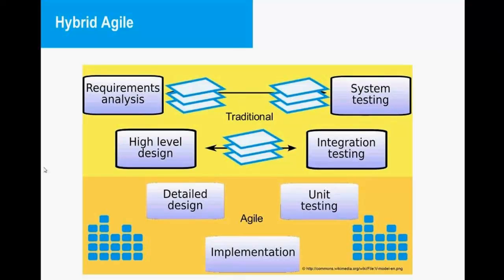What is special about the V model is that each phase must be finished before the next phase begins. So you have to go down the V on the left and then go up to do all the testing. Because of that, the V model is a model for verification and validation. Testing of the product is always planned in parallel with the corresponding phase you're in during development.